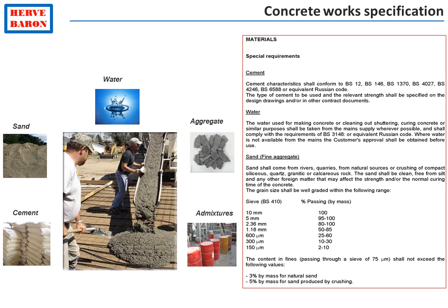The quantity of each type of work also needs to be quantified in order to issue inquiries to potential construction subcontractors. This is done by means of the issue of the Civil Works Bill of Quantities.